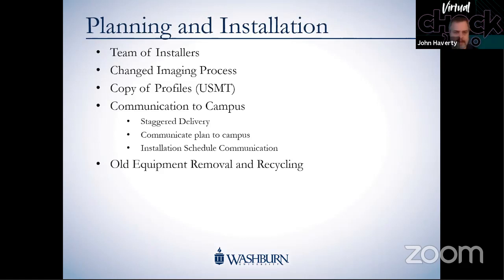The other piece of this, and the next slide will cover this more, is communication to campus. Of course, we wanted to get the word out that, one, we got the lease, and two, that we were going to start showing up in buildings to do installs. So we did a communication plan out to the campus and gave them our whole schedule for the different months, because we had this lined up for about six months, I believe, with systems going to arrive about the 19th of each month. We wanted to share that with the campus and lay out what areas we thought we'd be in contact with prior to just showing up with computers, to give them some type of heads up that we would be there.